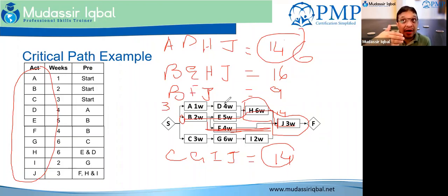So with the passage of execution, your critical paths may change, and you may suddenly get a new critical path, because critical path has nothing to do with the criticality or the complexity of the task that you are doing. It is about the duration.